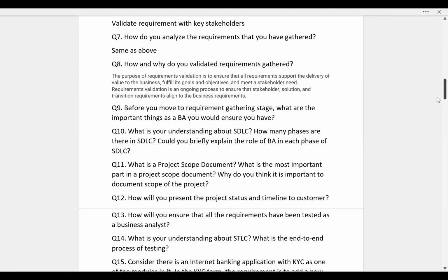Then analysis happens of that sprint backlog, whatever they have to do, then design, development, testing, deployment, all those things happen in the sprint only. So in every sprint, your planning, analysis, design, development, testing, deployment happens. That's why agile is an iterative and incremental way of delivering a product. Why iterative? Because your SDLC is being repeated in sprints. In the next sprint, again all the cycles will be repeated.